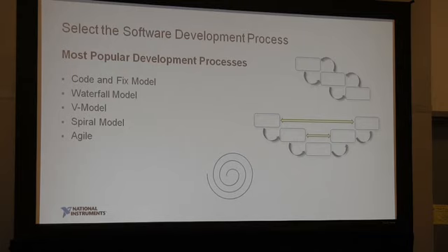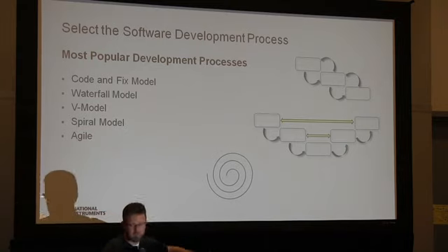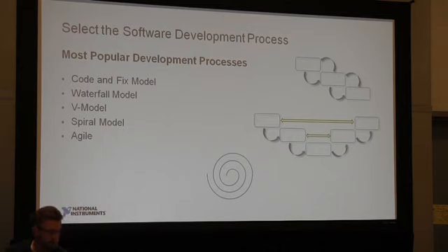And to the question earlier, how do you define what your granularity is? I'm going to skip around here a little bit. With the spiral method, or the spiral development process, you define a set of requirements and implement that. Then you define the next set. As you spiral outward, you are defining the smaller, more granular pieces.